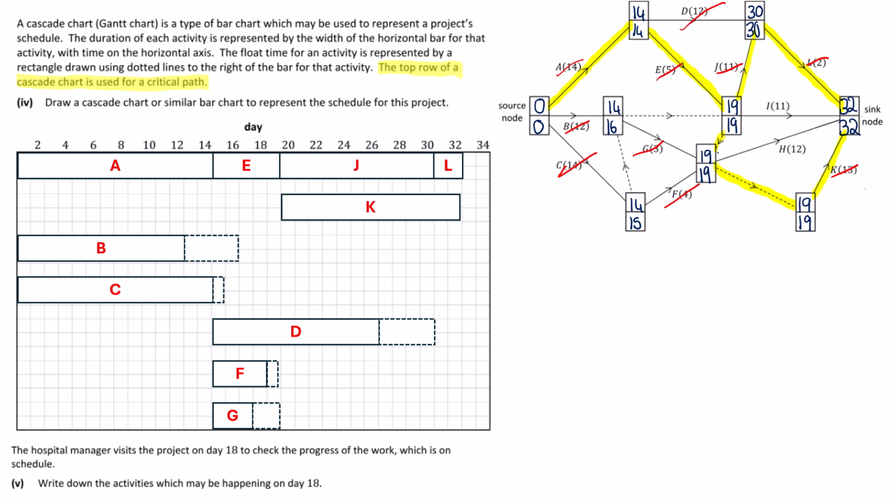So H and I, there's no rule you have to have every box or every activity on a different line. So I'm going to fit in the others where I can. I starts at 11. No, sorry. I starts at 19, has a duration of 11, and that will bring us up to 30, and then it is allowed up to 32.